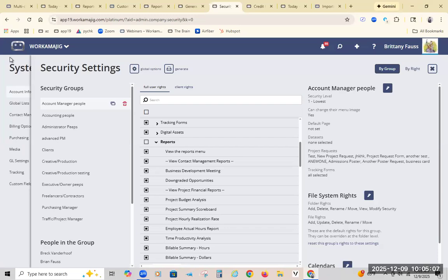So if you go into a report and say, give me the campaign budget for every project, you're going to see that same campaign budget. So your budget is overinflated for that field, and we wanted to make sure that didn't happen. That's part of the control of not allowing everything to be done in that report, but it gives you quite a bit of information. Most of it you can drill down into and click through to the transactions.